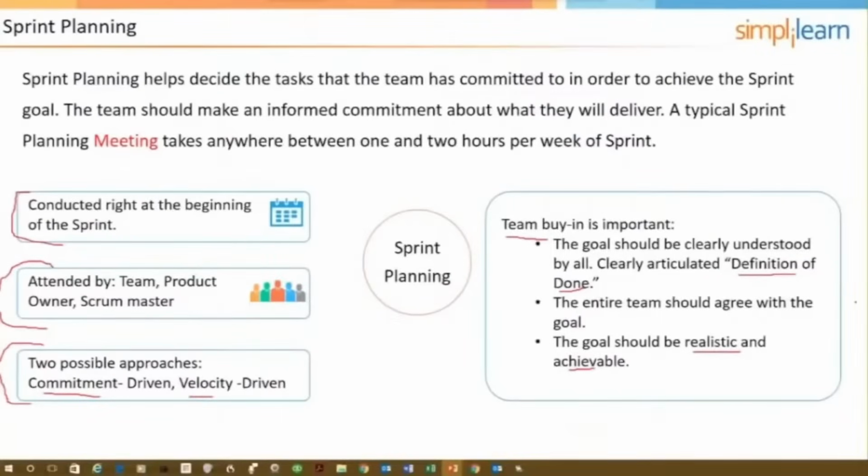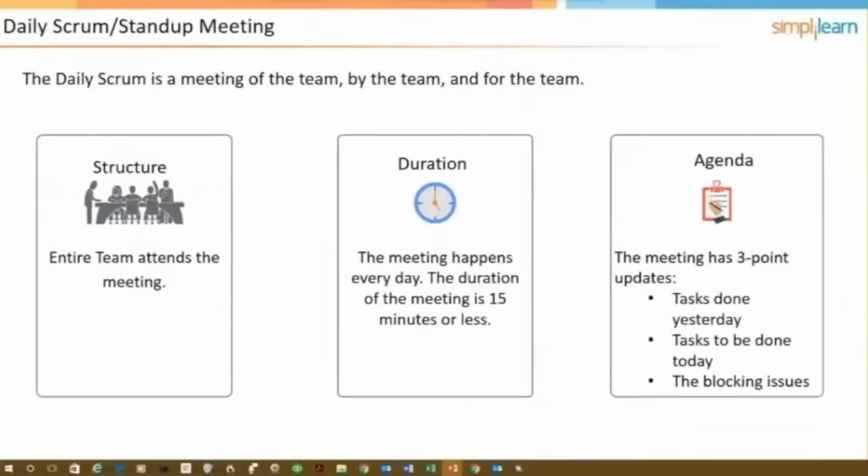Okay, the Scrum meeting, Daily Scrum, we've talked about it, right? The entire team attends the meeting. Could the product owner be there? Yes. Does the product owner need to be there? No. Sometimes the product owner can be an impediment to the meeting, but would be welcome. But if the product owner started asking questions or became the focus of questions being asked, the Scrum Master would have to help facilitate a change, because that would not be effective for the daily Scrum.